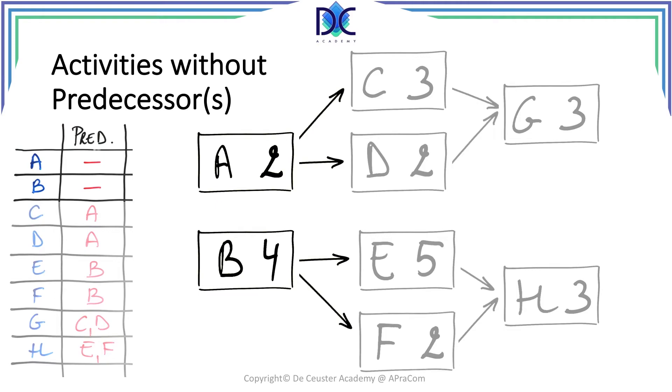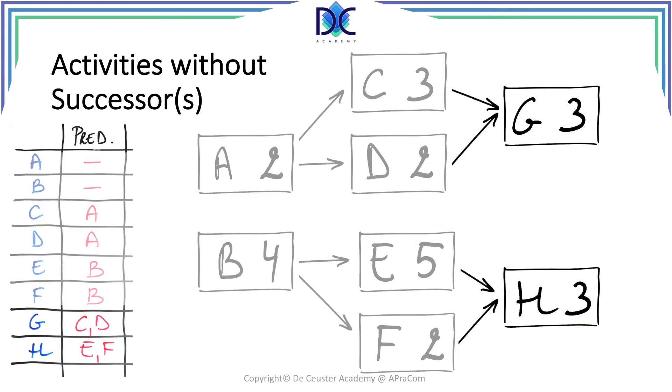Let's start with activities without predecessors. Like I said, A and B have no predecessors, so they are at the beginning of the precedence diagram. The same we do with activities without successors, but now we know that they are at the end of the precedence diagram. So we already know the start of the network and the end.